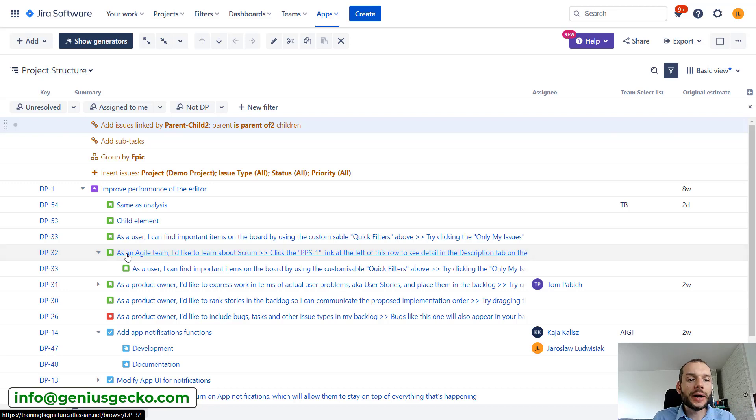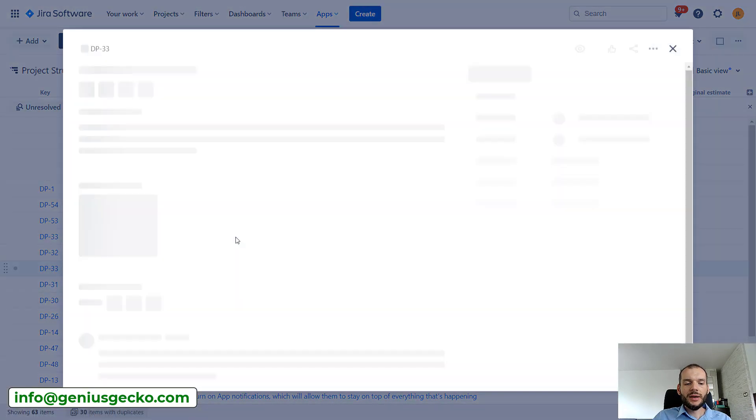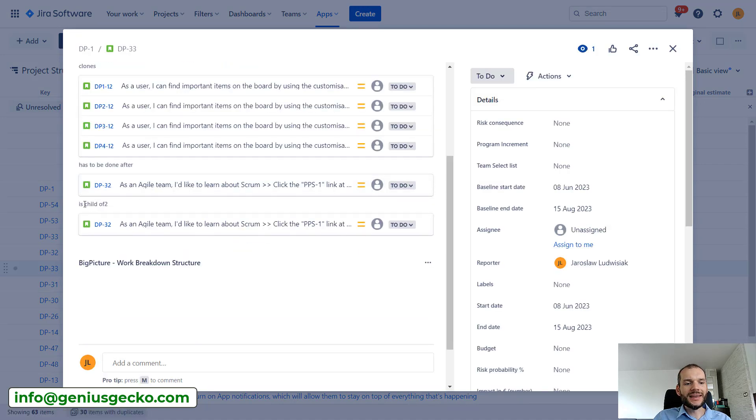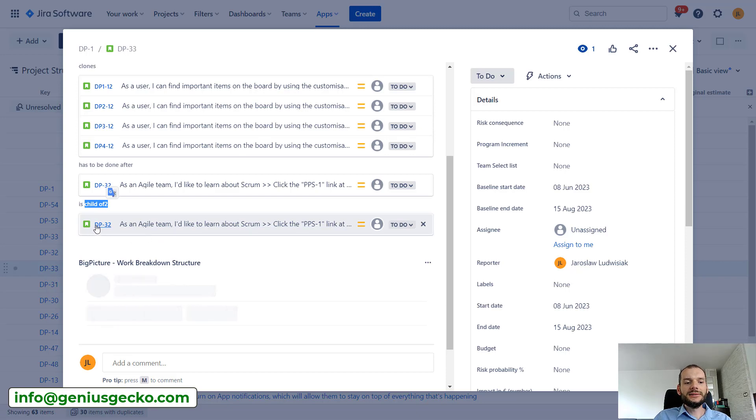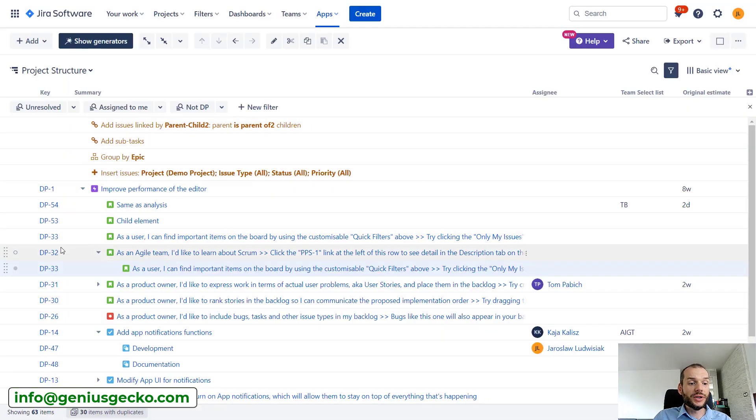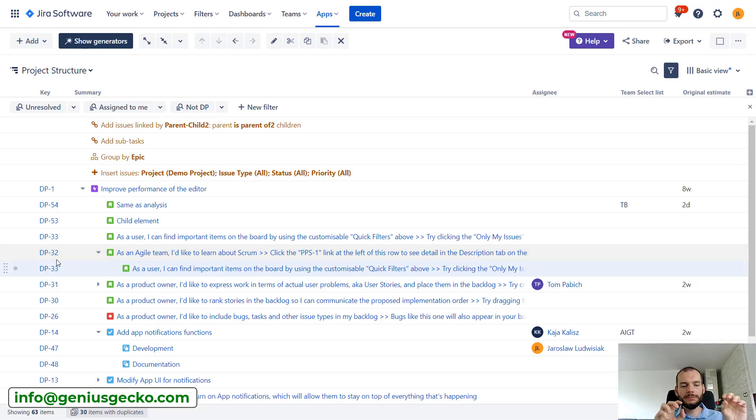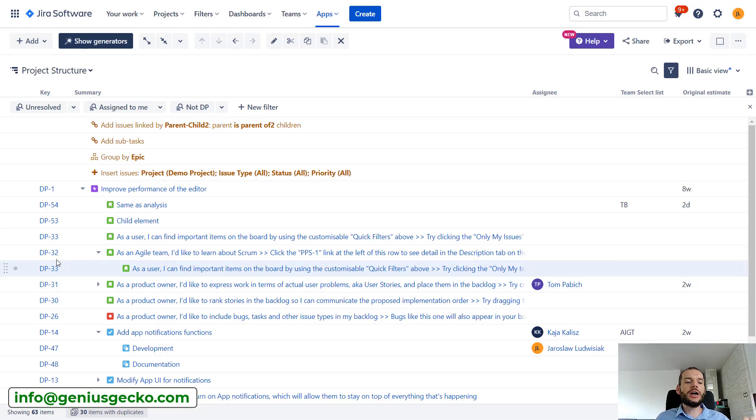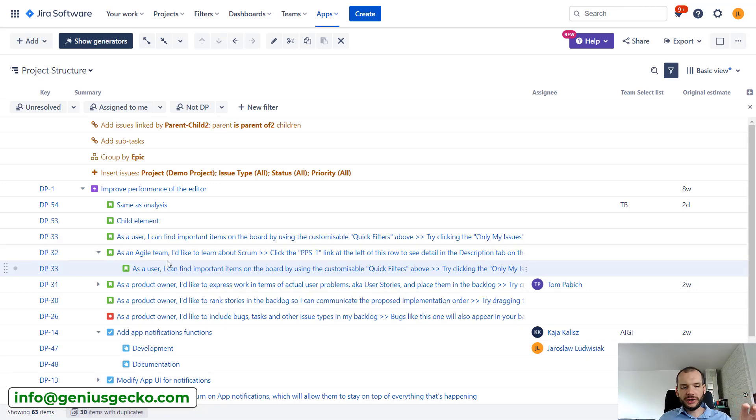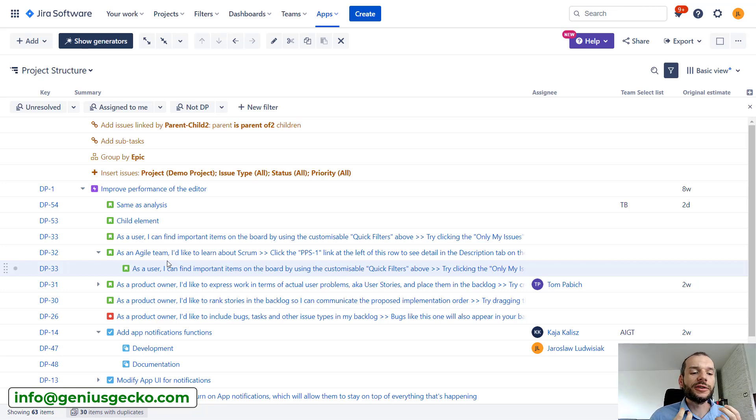So why does structure consider the parent child relation? If I click on one of these issues, you will see that I have a link over here 'is a child of two', and it is a child of issue DP-32, which is the parent in a structure. So basically, thanks to the fact that issue link exists between those two issues, structure understands this link as information about hierarchy. So we could have actually multiple levels of stories being one being the child of another and the child of another just by using links, dedicated link type on the issue level.